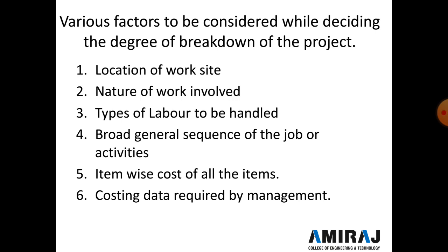After preparing the list of the activities, the relation of these activities is decided and they are arranged in a proper sequence or order in which they are to be performed. When the project is split up in this way into various functional elements, this will not only help in preparing the network for the project but also in planning and scheduling the activities.